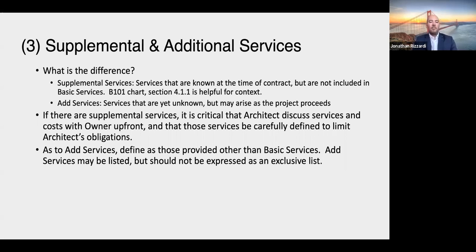The main recommendation here is that if you are undertaking supplemental services, it's really critical that you discuss this with the owner up front and carefully define what it is that you're doing, similar to basic services that I just talked about. The reason I say that is that supplemental services can be a very significant scope of work. It could be architectural interior design or something like that, which could be a massive amount of work. So it's got to be defined what you're doing and how you're getting paid.